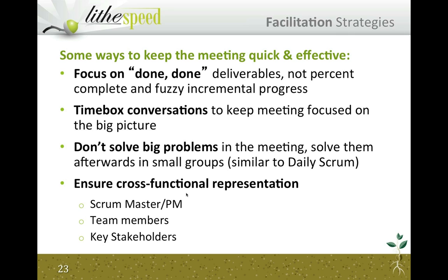Again, typical Agile trick here, you tend to time box the session itself. The initial part of it, where people are updating the board and talking about what's going on, is really quite brief. In our experience, it can be anywhere from maybe as little as 10 minutes up to perhaps 20 or 30 minutes, usually not much more than that, because a lot of the specifics of what happens on the board and what things need to change happen in little huddle sessions. Again, very similar to what you see in a daily stand-up.